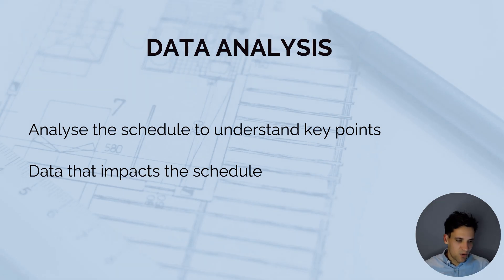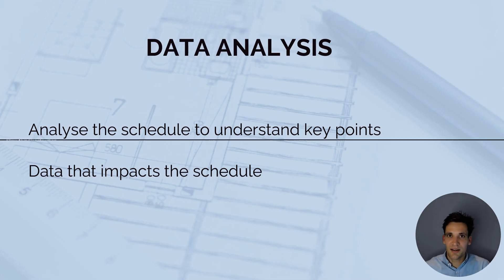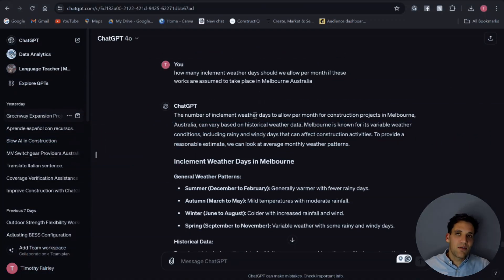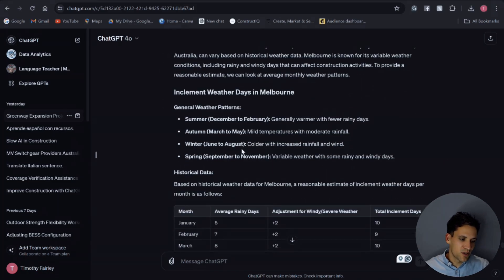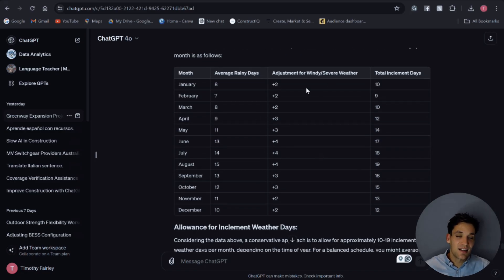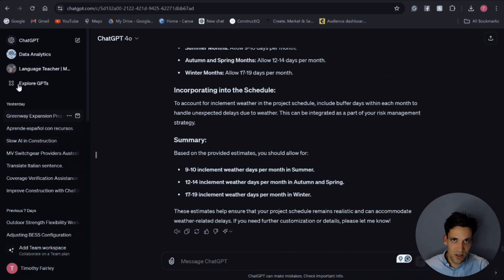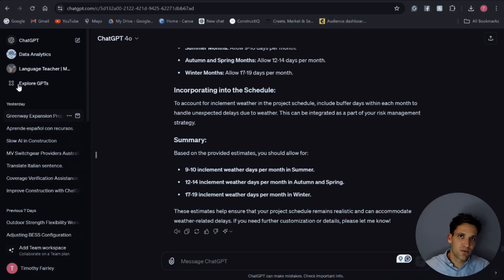The next thing you can use ChatGPT for is data analysis. You can use it to analyze data from the schedule, understand the implications, perform earned value management calculations, and provide insights you can use to manage the schedule better. As an example, I've asked ChatGPT how many inclement weather days we should allow in the schedule if we're performing this project in Melbourne, Australia. It's looked at historical weather data, the average number of rainy days per month, and based on the time period of our project, it's told us how many inclement weather days to allow across different seasons.